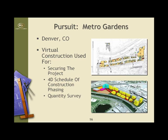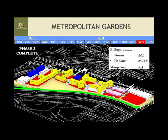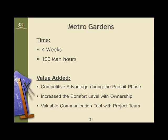It's a fairly large project in Denver, Colorado. We basically took monthly snapshots and were able to show what the billing is this month, what it is to date, and then the manpower needed on site for that month. It definitely helps with the ownership group because they can take this information to their lenders and there's no mystery involved — it answers a lot of questions that typically come up, and everyone can essentially understand what the project is and what it's really going to need.